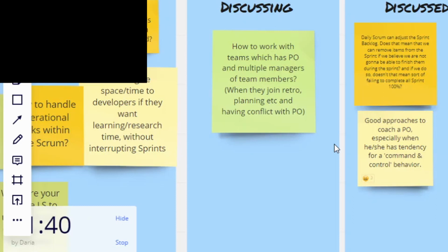Okay. I have maybe 2 interesting examples of this. In my past assignment, a delivery manager always used to pop up in my stand-ups. Whenever he came, the team members were just upset out of the blue and never used to be attentive. I was okay in 1 or 2 instances. When he came the 3rd time, and he used to question the team, I said, yes, you are important, but can we park it until after the stand-up? As a Scrum Master, I think it is important you protect the agenda for the daily Scrum. You need to be gutsy sometimes, right? You need to say, yes, it is important, but you need to stop for 15 minutes.